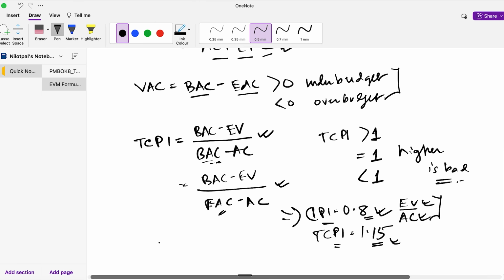So to summarize, the way TCPI can be linked to your cost performance index is by understanding that if your TCPI is greater than your CPI, which is in this scenario, this is a tricky situation. This is a bad situation, and that is primarily because now the project has very small financial headroom to complete within budget. However, if your TCPI is less than your CPI, it means it's a good thing, okay, which means that your project has a lot of headroom.